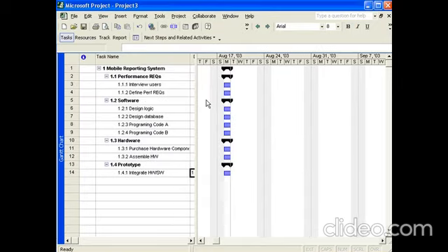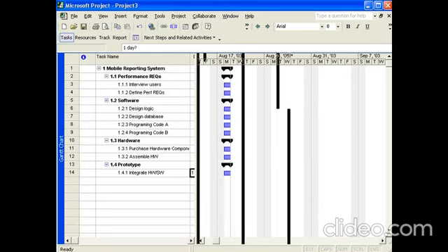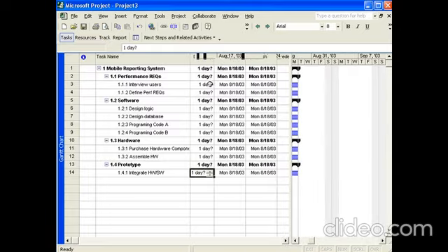In this lesson, we will demonstrate how to insert estimated durations of specific tasks. These estimates are based on prior experience and talking to experts who will be performing the task. Let's assume we've done this and we're ready to enter the information. So we go to our Gantt view, where our work breakdown structure exists, and the first thing we have to do is push out the window of the Gantt chart to reveal a set of columns, including the duration column. It's in this column that we enter the information.